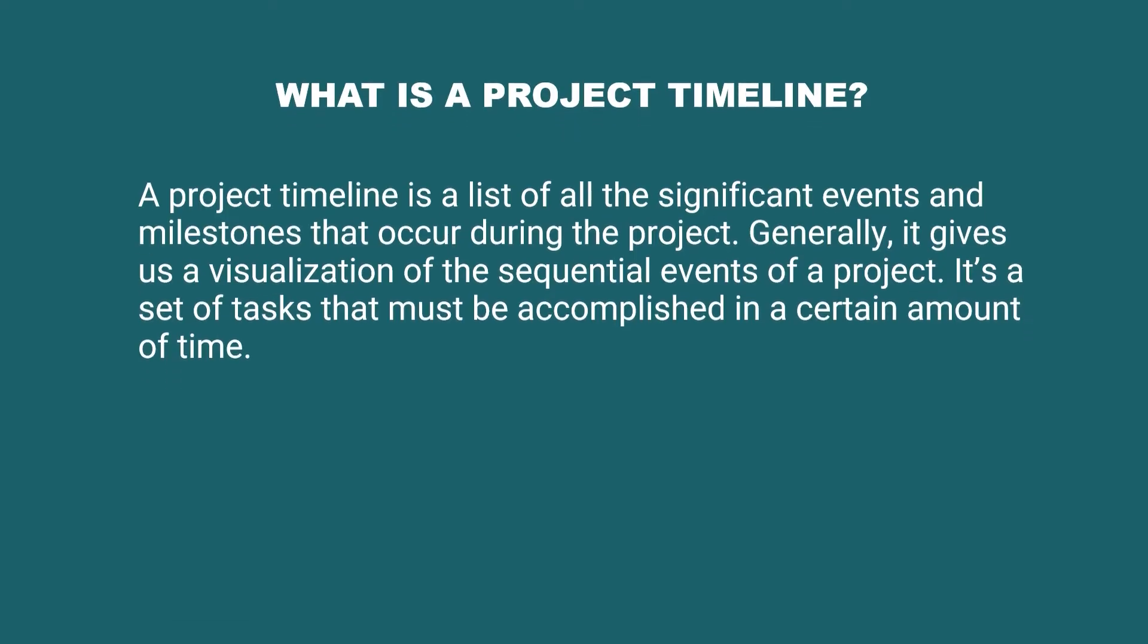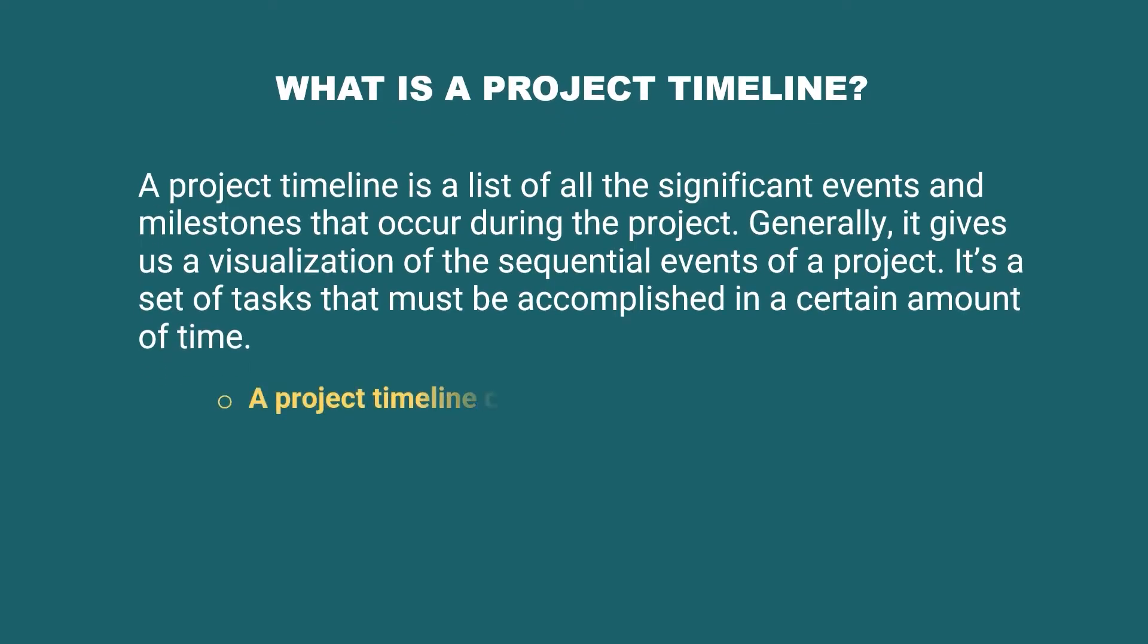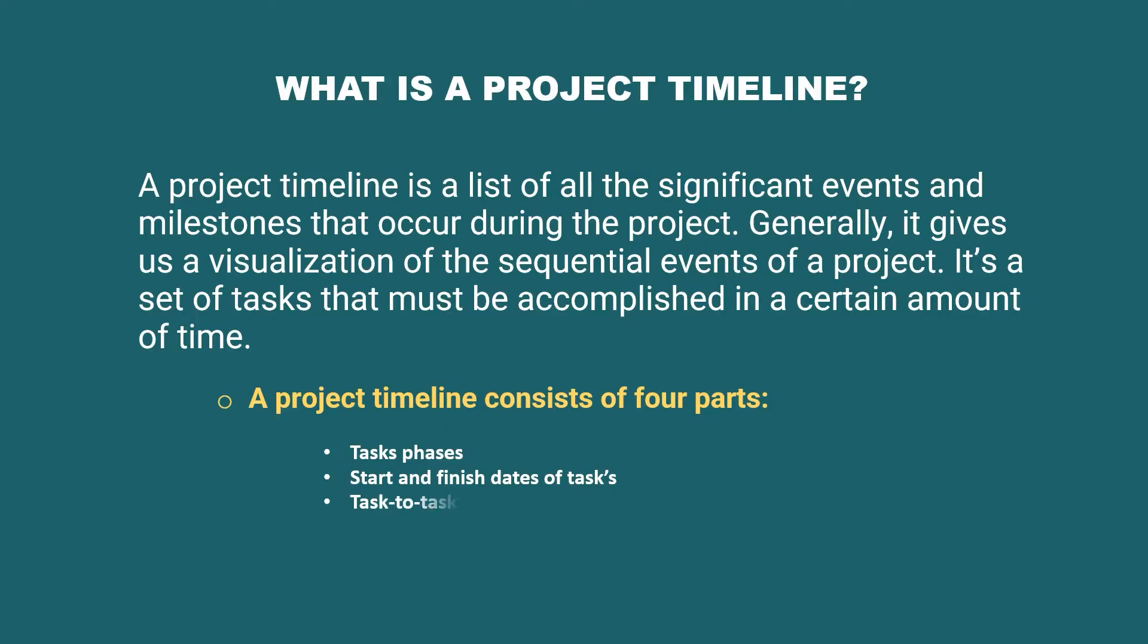A project timeline consists of four parts: task phases, start and finish dates of task, task to task interdependencies, and milestones.